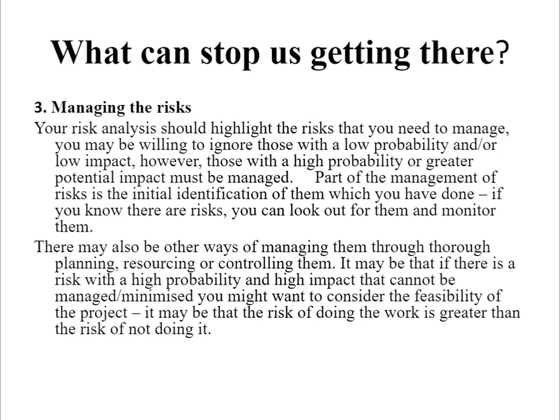In managing the risks, make sure that your risk analysis highlights the risks that you need to manage. You may be willing to ignore those with a low probability and low impact. However, those with a high probability or greater potential impact must be managed, and it is a must.